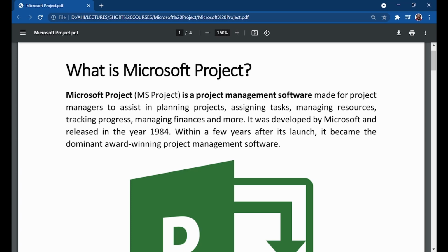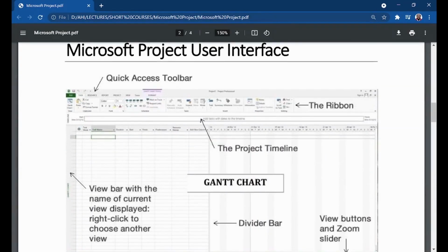The program allows you to also make changes because sometimes certain things delay, and so you can actually go into the program and increase the number of days something took. And once you do that, if you have set your program to auto schedule, it will rearrange everything and give you the adjusted durations. Certain things can also complete before the time we planned for it, and so you can make all those changes and the program will recalculate and give you all the information.